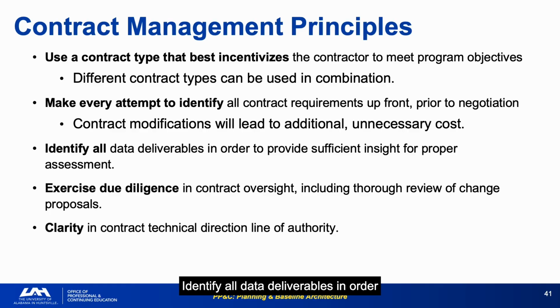Identify all data deliverables in order to provide sufficient insight for proper assessment. This is the PP&C self-interest statement. If the contract doesn't require the reporting data, you can't do your analysis. You'll be making decisions based on incomplete information. Ask only for what you're willing to pay for. Every deliverable on the contract has a cost. Don't include deliverables you will not use. Do include every deliverable you need for credible analysis.